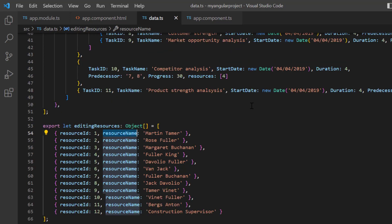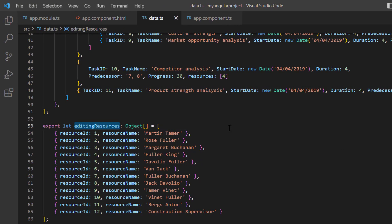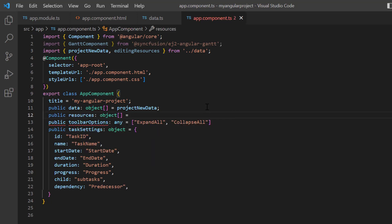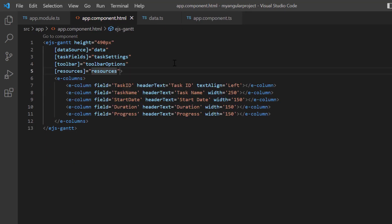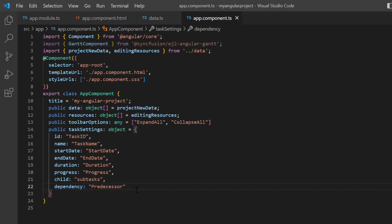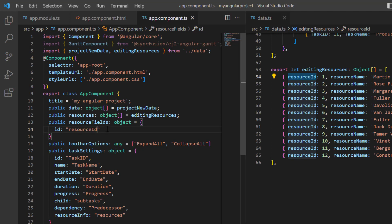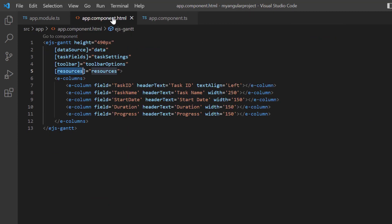This collection needs to be mapped to the Gantt chart control using the resources property. Notice the object project new data contains resource IDs in each task. Open the app component class and import the editing resource object from the data.ts file, then assign it to the variable resources. Assign this variable to the resources property of the component. In the task settings, map the assigned resources of the task using the resource info field. Also define the object resource fields, and map the resource ID to the ID property and the resource name to the name property. Assign this object to the resource fields property of the Gantt component.